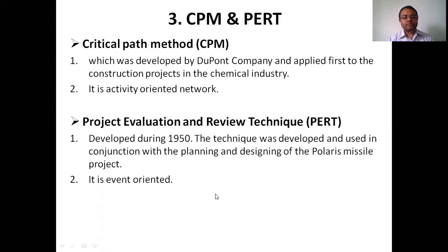Suppose you consider that the structure is divided into plinth level, first floor level, second floor level, third floor level, likewise. So plinth level, first floor level, third floor level, these we can call an event. Of course, if you want to construct a building up to the plinth level, we have to go through different activities.